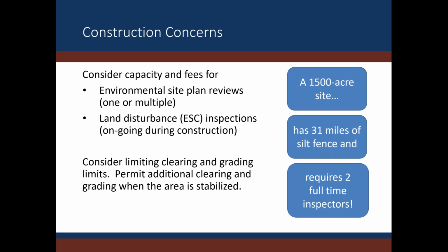Consider the impact of construction. The selection of panels and arrangement on site should be optimized to minimize grading. The impervious nature of panels themselves creates stormwater runoff that must be properly controlled, managed, and maintained. These projects require the submission of both stormwater and erosion and sediment control plans to comply with federal and state environmental regulations. Rural and agricultural localities may not have the capacity or expertise to review plans for such large projects. In that case, we recommend having the plans reviewed by a licensed third party at the expense of the applicant.